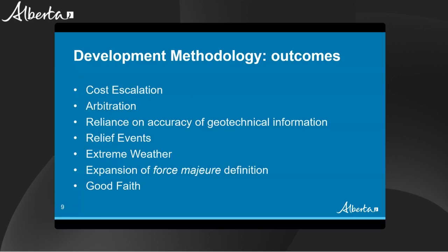So in terms of cost escalation, we heard from industry and our consultants that it wasn't always contractors who were in the best position to manage the risks of escalation and supply chain costs, especially on those longer term projects. We learned a lot through the pandemic. We've realigned those risks so that the province would assume certain escalation risks on longer term projects. And then we'll give you more detail when Ghassan goes through that later in the presentation.